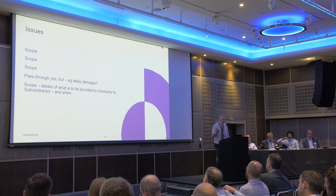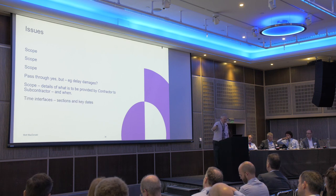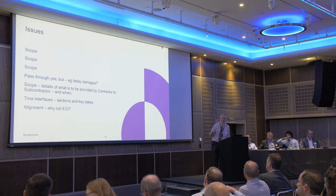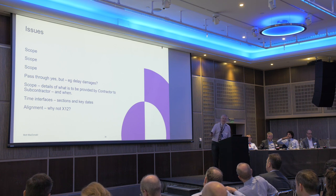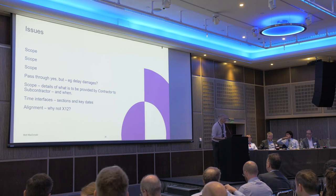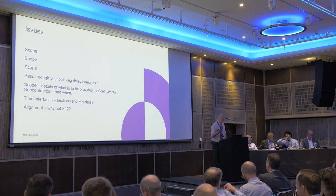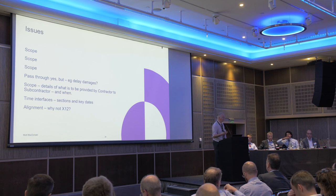You've got to tell the subcontractor what you're going to provide to them. Time interfaces — in the ECS you've got sections and key dates. Why don't we use X12? Contractors — surely you're supposed to be encouraging collaboration, joining up, working with your subcontractors. Has any subcontractor in the room ever used X12 with their supply chain? Just a thought for discussion.